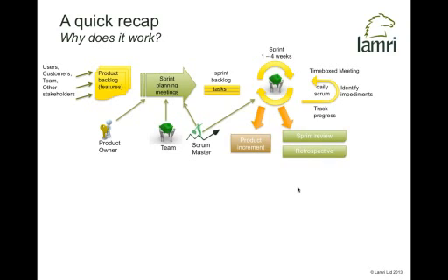And then a bit of analysis, bit of design, bit of build, and then test it. And then at the end of that short block of time, somewhere between 1 and 4 weeks, what have we got? We've got a little slice of our system which we've built, and more importantly, we've tested. And really important there, we can actually go and review that with the customer. We can actually show them, do a demonstration.